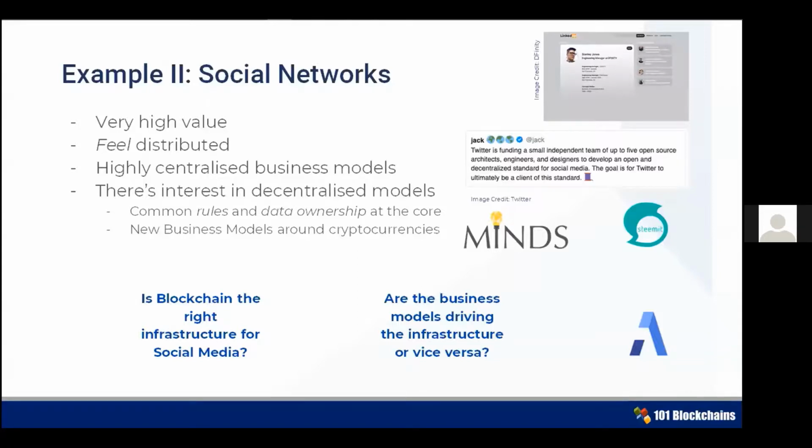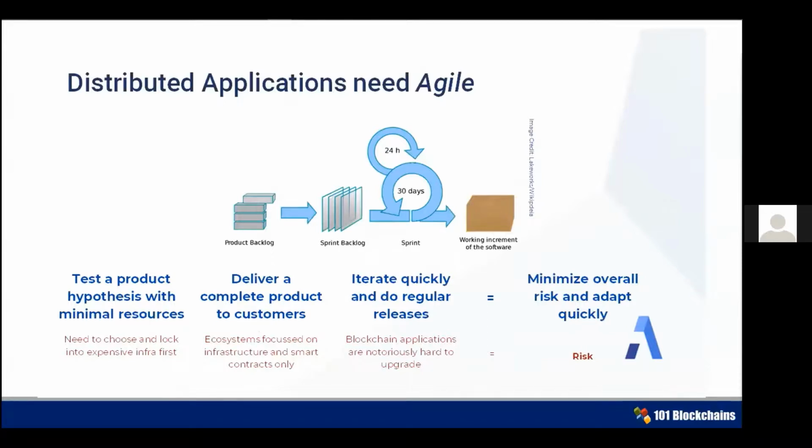Now, whilst we're on social media, let's also talk about how such applications are brought to market and scaled. According to Mark Zuckerberg, the first version of Facebook took 2 weeks to develop. They then iterated that application for quite a long time before they had to rebuild. In other words, they followed a truly agile approach. Agile, Scrum, and similar frameworks are all about minimizing risk by approaching solutions quickly and iteratively. Every development cycle accumulates risk and cost, which is why keeping cycles short is important. You want to have the ability to change your mind and validate what you're doing. And that process needs to be able to take you to scale.